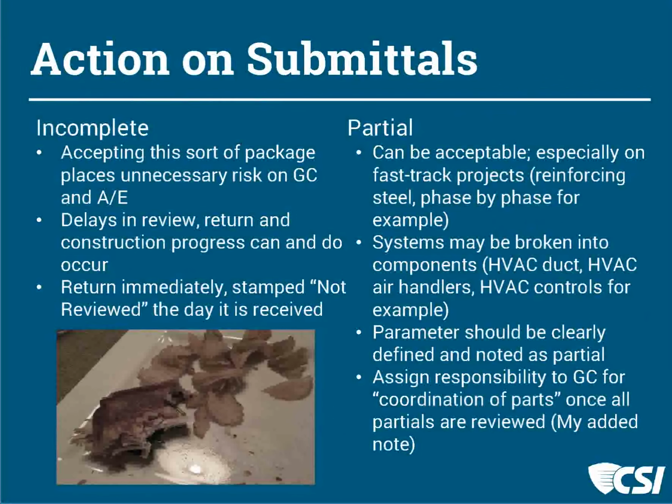And the final requirement, to assign the coordination of parts to the general contractor, is something I personally believe is important. And again, this is something that can go in your supplementary general conditions to say, we'll do this to help the project, we'll do this to help the schedule, but understand we're assigning you specifically the coordination of these parts once the partials are finished. And we accept no responsibility or risk related to that partiality, if you will.